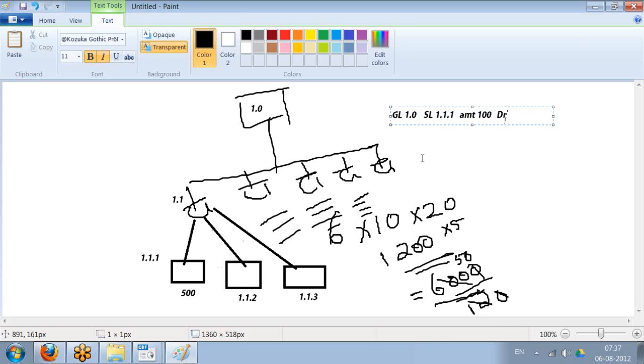So in big projects, always the project management system is linked to the financial accounting system, because otherwise if somebody asks for a planned versus actual budget at a work package level for a project which has 6,000 work packages, you'll be in trouble. So if you really want to track plan versus actuals at a work package level, you need to link your project management system to the financial accounting system.